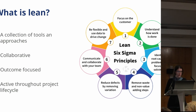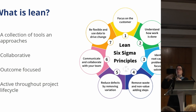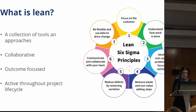Some of those tools include things like pull planning, where you start from the end goal and work back, reviewing milestones and breaking down the project. People are probably familiar with this — it's a standard project management approach. You create a weekly work plan, and the key thing about lean is it's an active process all the way through your project. You can also use integrated project delivery, which is a really collaborative approach focused on sharing knowledge and insights.